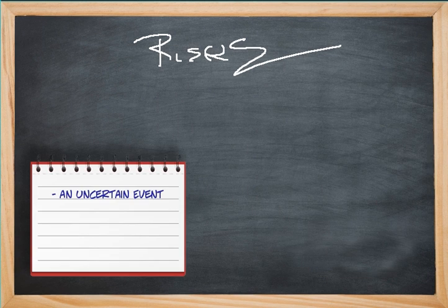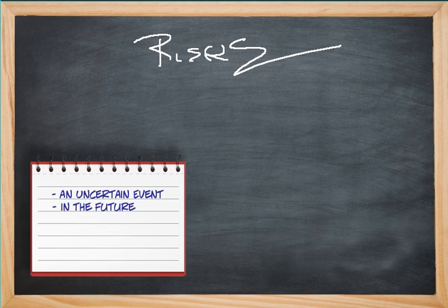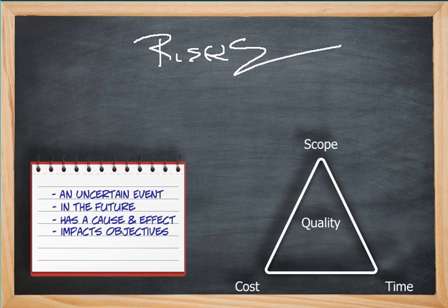What is a risk? First, it's an uncertain event or condition. It's always in the future, has one or more causes, and could affect at least one project objective. It's usually in the form of our triple constraint, which is impacting scope, in other words the features, schedule which is time, cost same as budget, and quality, which implies a certain degree of customer satisfaction.